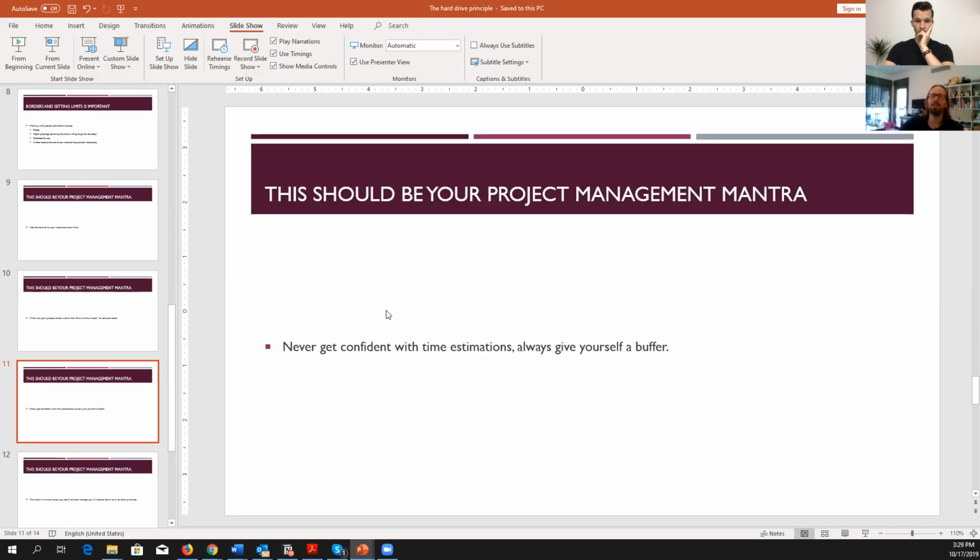Meaning, if you know that a task takes you a week, and then you say to the client, 2 weeks, and you have it, if you deliver it after a week, you earned a week in the process, the client is over the top happy, and you just over-delivered and